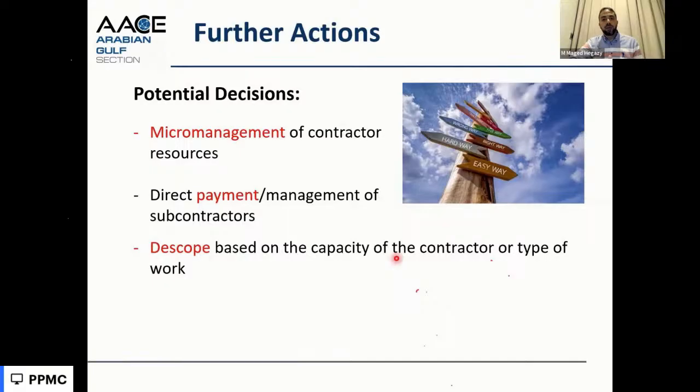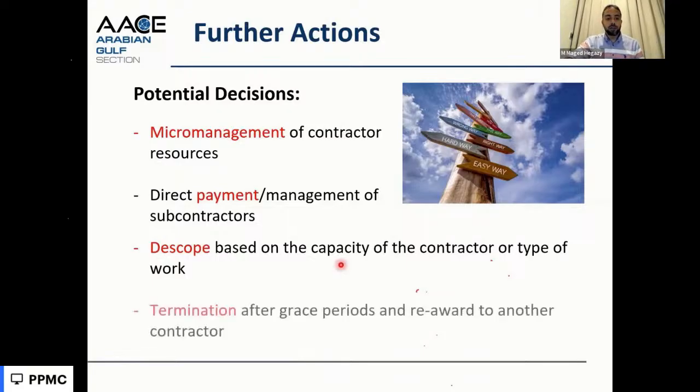So we'll descope some zones from the contractor, so he can perform completing part of the project on time, and get other contractor doing the other parts on time.